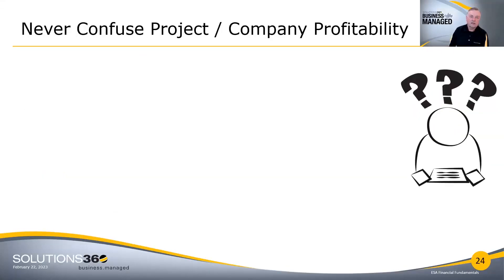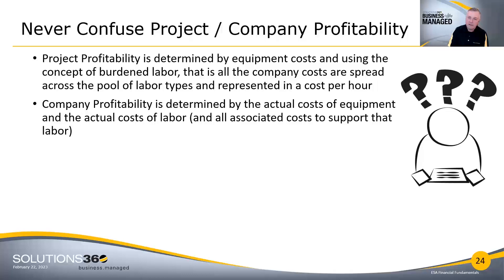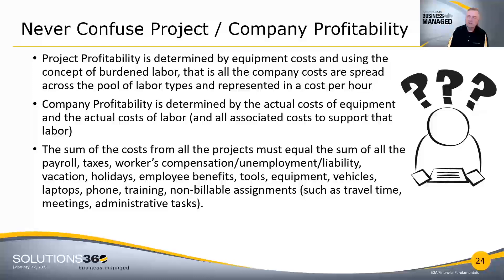We never want to confuse project profitability with company profitability. I can show very profitable projects, but if they don't drive company profitability, I'm missing a link. I determine project profitability by equipment and burdened labor — all company costs are spread across the pool of labor types and represented as a cost per hour. Company profitability is determined by actual costs. The sum of all project costs must equal the sum of everything I'm writing checks for. We went from the grand concepts of three financial statements — income statement, balance sheet, and cash flow — all the way down to two practical applications: track your time to projects, forecast to completion, burden it correctly, and you'll run a successful integration business.